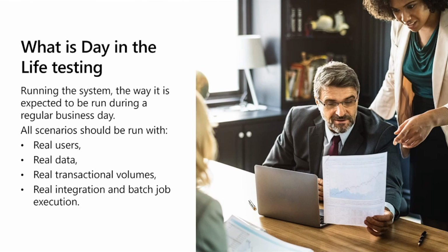You need to set up the batch job execution the same as the production environment, with periodic scheduled tasks. Schedule the batch jobs with the same time periods in the system, maybe early morning jobs, night jobs, even midnight jobs. We need to understand the behavior of the jobs running at that particular time in the production environment.